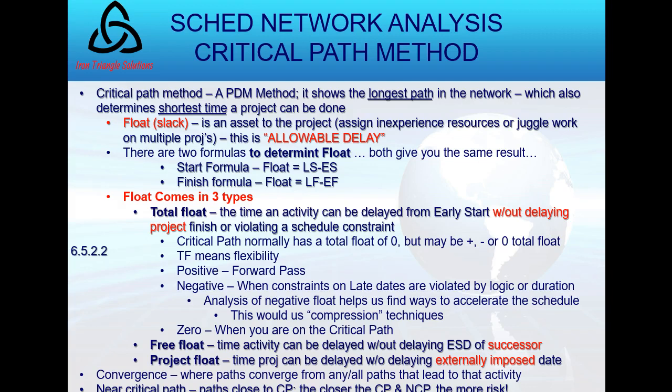And critical path is the one every exam will focus on. It is the most common. And it will only ask you questions about the others in word form, but you won't have to do the math. So the math here is important. The critical path method is the longest path. This is a definition from the PMBOK. The longest path in that network, that schedule network diagram we did, which also determines the shortest time that a project can be done.